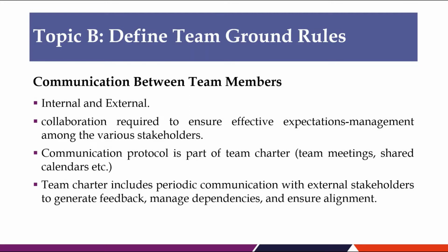The team will need to have regular communications with stakeholders outside the team. In many cases, the project team may have dependencies with other external teams, and collaboration will be required in order to ensure effective expectations management among the various stakeholders. Part of an effective team charter may include communications protocols inside the team, such as team meetings, shared calendars, etc., as well as periodic communication with external stakeholders to generate feedback, manage dependencies, and ensure alignment.